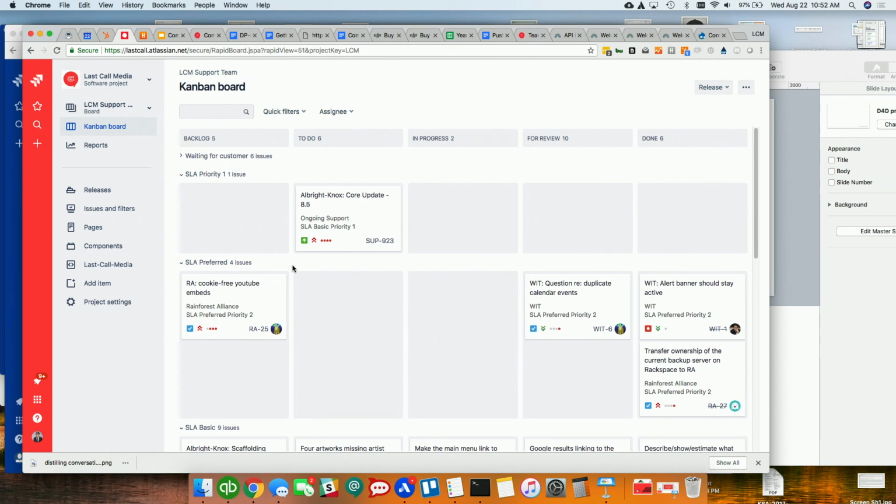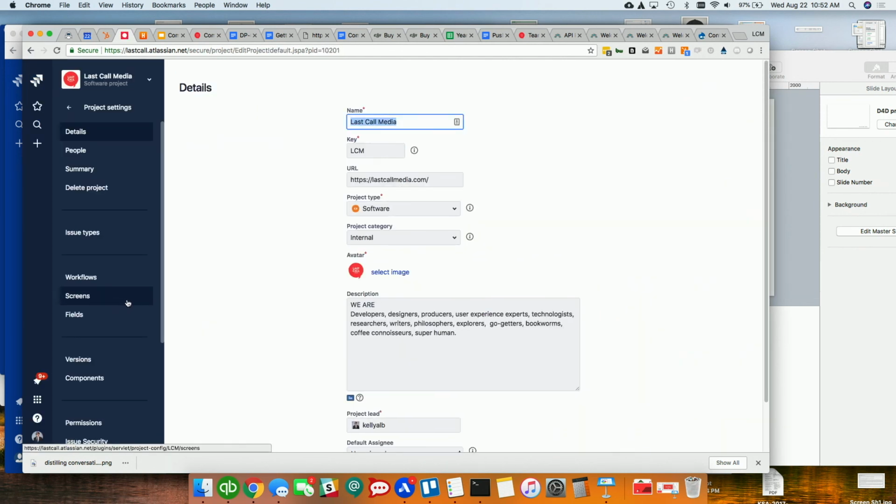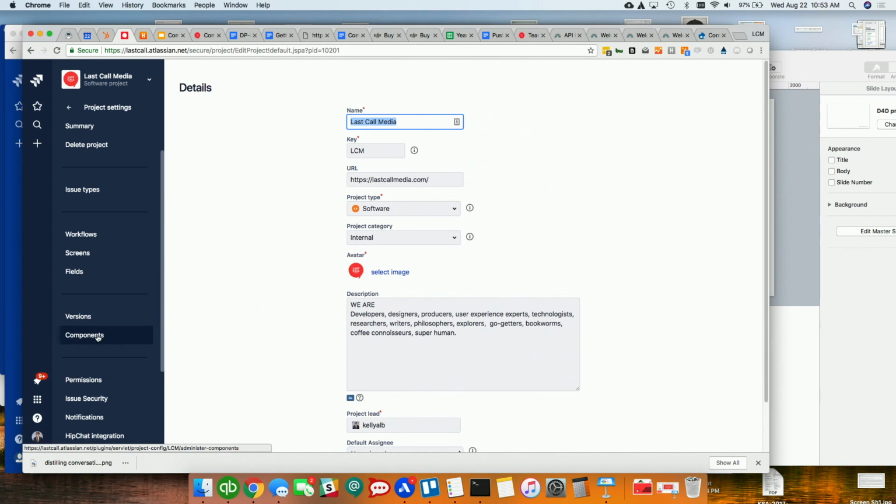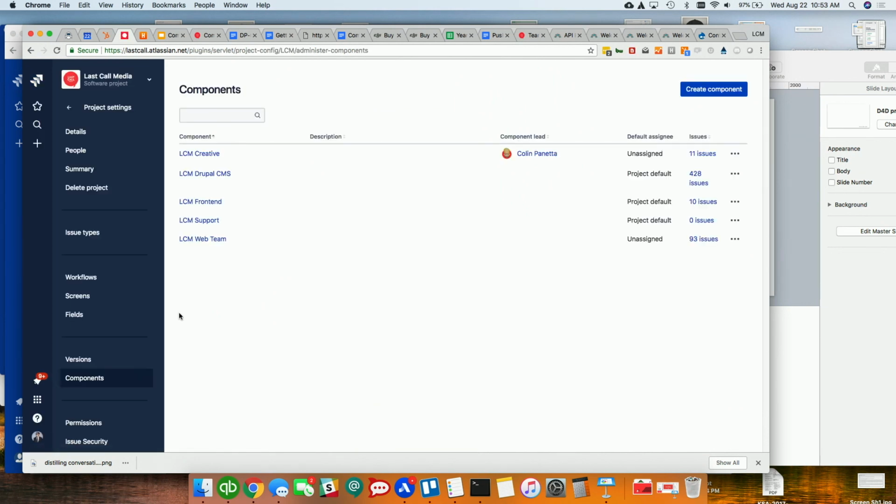I haven't really heard the term component. I guess I didn't notice it on the filter, but that's fields. Yeah. So if I go into the project settings of a Jira project, you've got the components right here. So can they be specifically defined by project? Right. They're per project, managed per project. But you can add the same component to multiple projects, and it works across multiple projects. So by default, do you get a whole bunch of components when you set up a new project? You get 0. If you set up a brand new Jira project, you'll have 0 components.